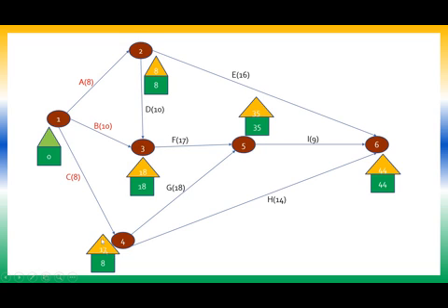So the minimum of them is 17. So I write 17 here. Now for this, it will be 8 minus 8, 0, or 18 minus 10, 8, or 17 minus 8, 9. So out of all these three values, which is minimum? 8 minus 8, 0 is the minimum. Right? So your forward pass and backward pass is done.